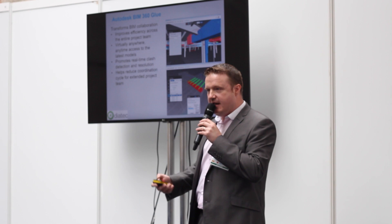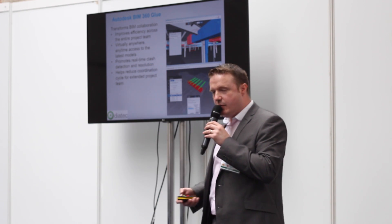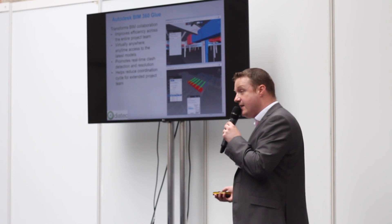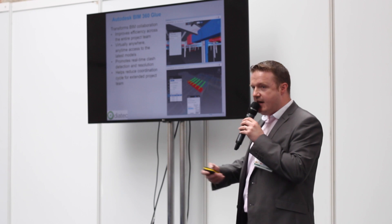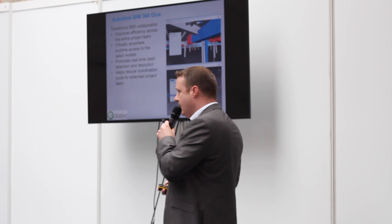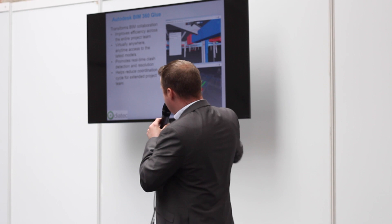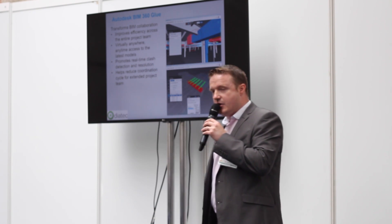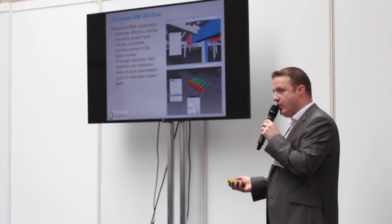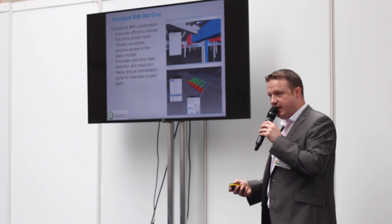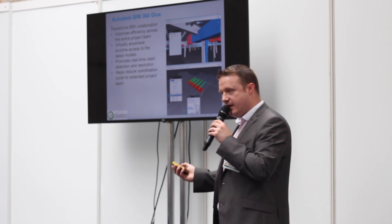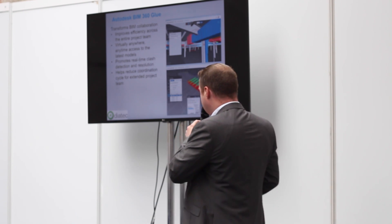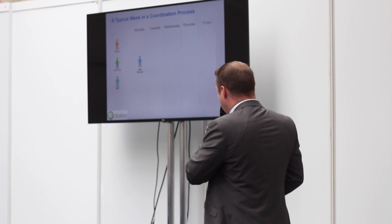As the model is maturing on a day-to-day, week-to-week basis, designated members as well as extended design teams can now start to clash against each other at a very early stage. It also allows us to reduce the coordination cycle for the extended design teams, so information back and forward is promoted at an earlier stage — way before it was in existing methodologies.